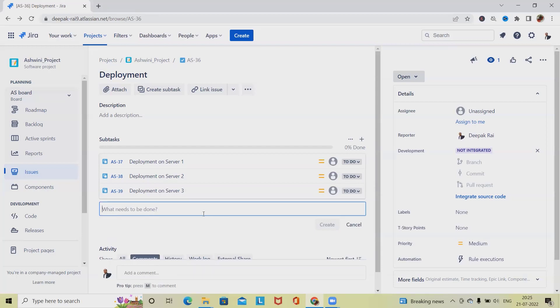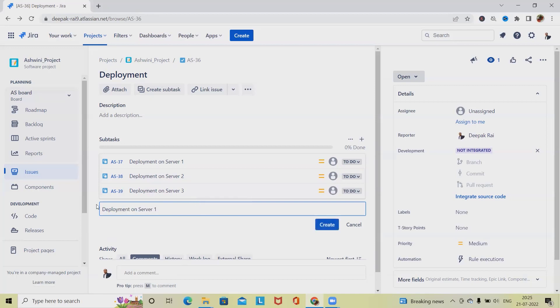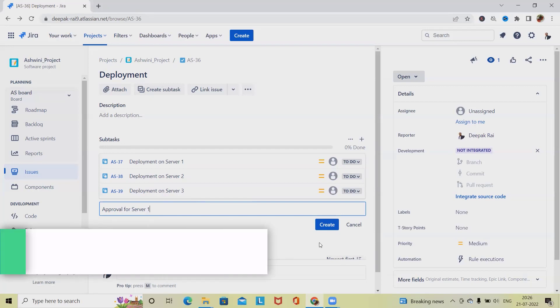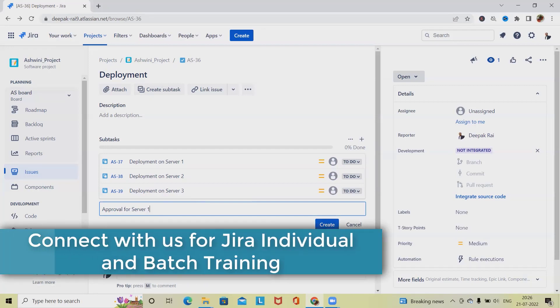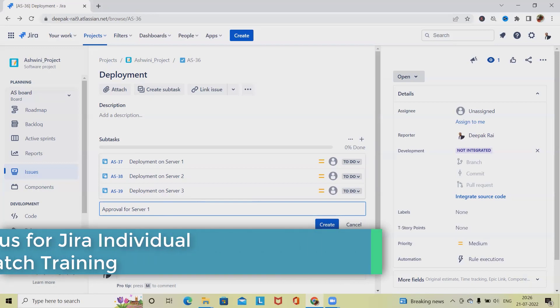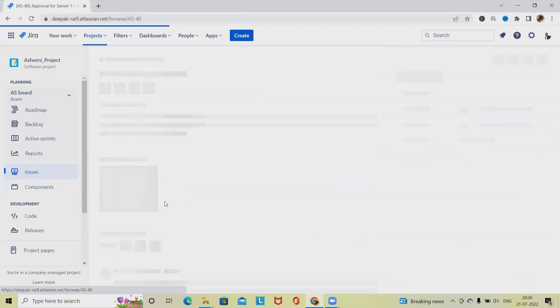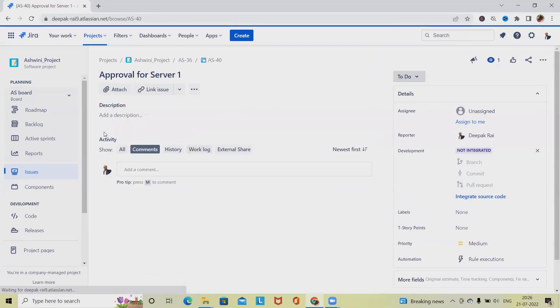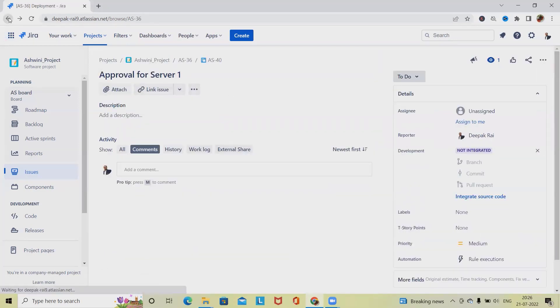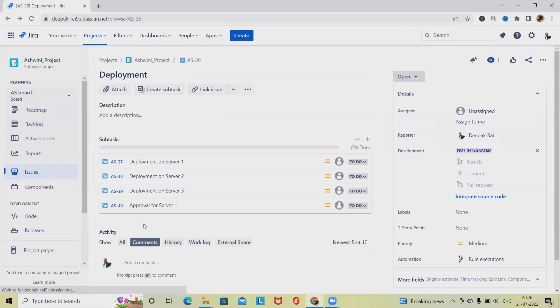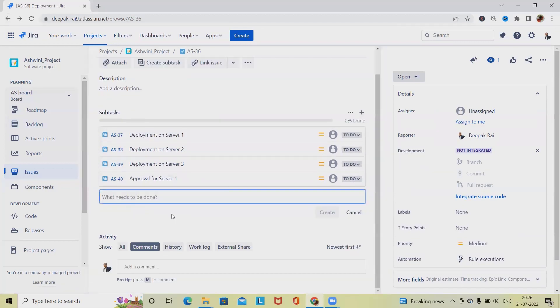But what if we have any additional activity like taking approval? So here, approval for server one. This approval might be required for different things like InfoSec approval, server owner approval, or management or business team approval. So here we can also further divide into several other categories. We can also add some subtasks related to approval.